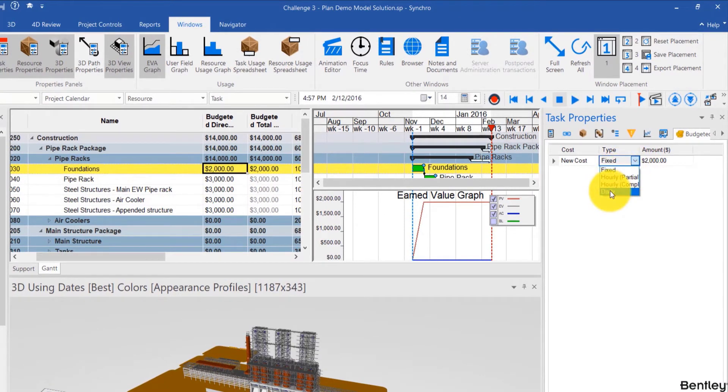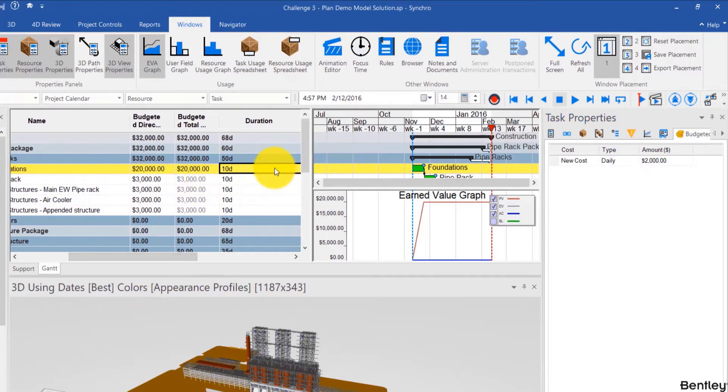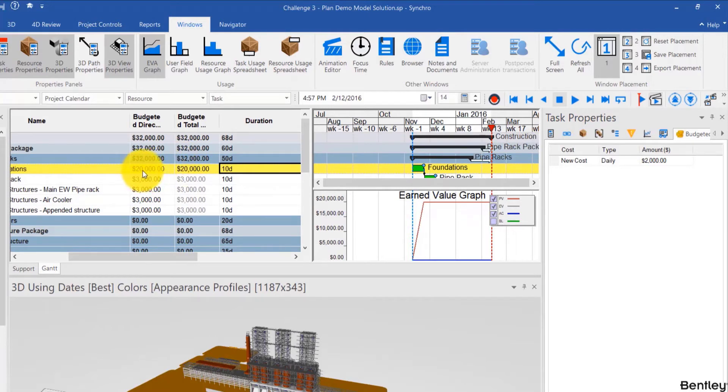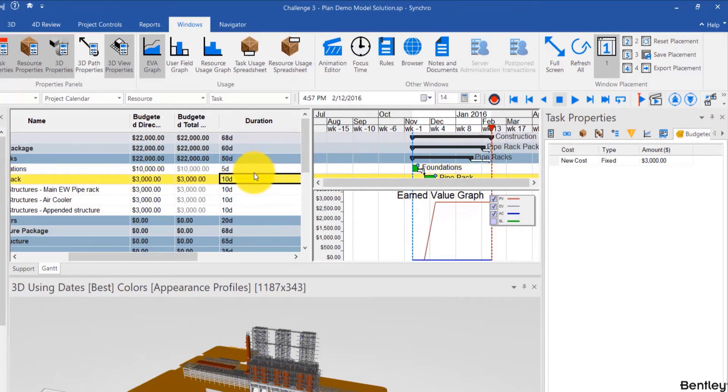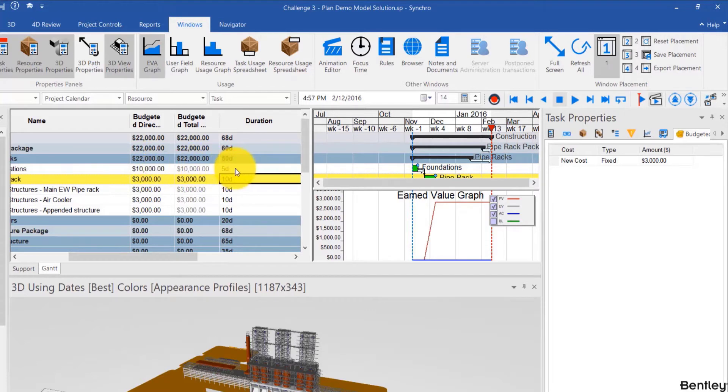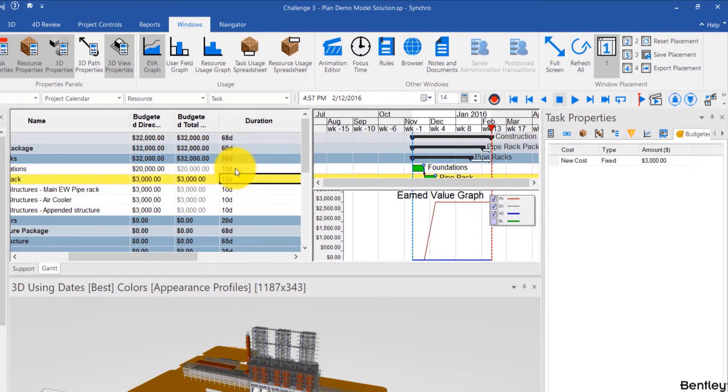If I choose for example daily, then when the duration of that task changes, for example from 10 days, automatically this is now 20,000 because the daily is 2000. And if it changes from 10 days to 5 days then the costs would become less like 10,000. I change it back to 10,000, I change it back to 10 days and 20,000.